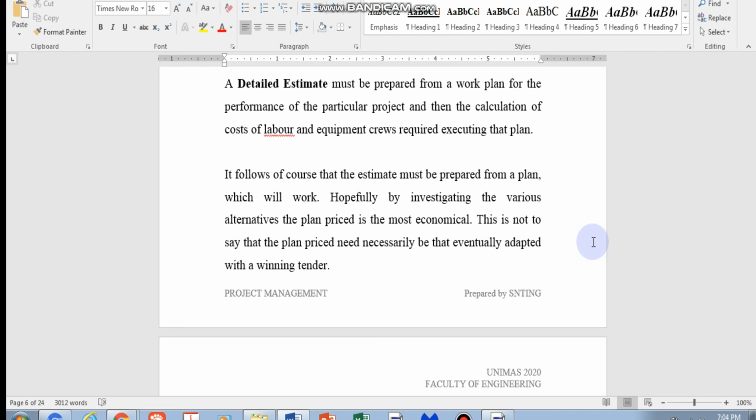Then after that, you replan your schedule, you put in your risk estimation and all that, and then that final schedule is the one that you will use with the resources list that you're going to produce from all the exercises you've done for time planning. Then you can use it for cost, one by one.